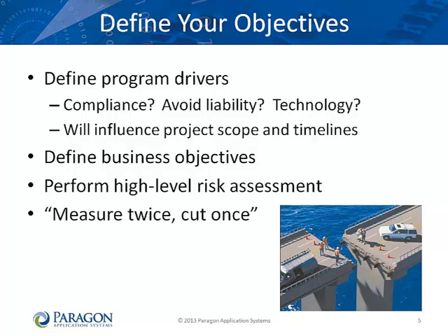Perform a high-level risk assessment. What are some of the risks of doing this project? What other projects in the pipeline may need to be delayed because of the EMV project? What might happen during your project that could put your goals in jeopardy? If one of these events were to occur, what could you do to mitigate the impact? At this very early stage of the project, your risk management assessment will be at a very high level. You will be able to refine it later as you begin to dig down into the details of the project.